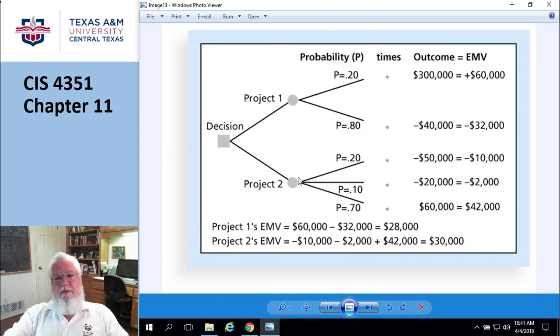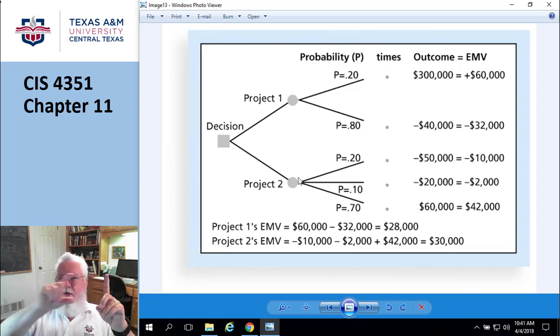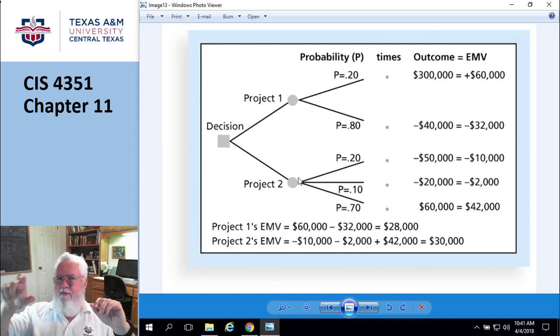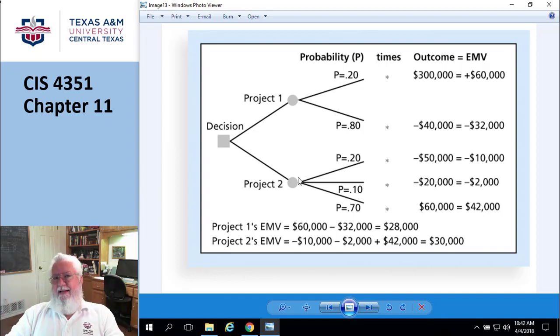And so you plug this into the computer, and let's say you have 5 variables that you have to deal with. I have a cost variable and a time schedule and whatever. And so you do that for each one of these things. And so you actually tell the computer to just pick a random number inside that range for all these variables and produce a result. It'll do it over and over and over and over as many times as you like until you can kind of settle on what you think the outcome number is going to be. And so you end up with a confidence of, okay, this is what's likely going to occur. It's actually kind of cool.